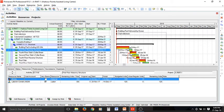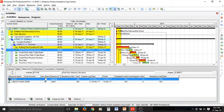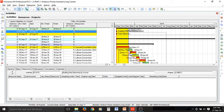In the first step we need to select progress spotlight in the menu bar and select the data date for our project — the date at which we want to track our project. You can drag to the right and select the portion of the project that you want to be tracked.